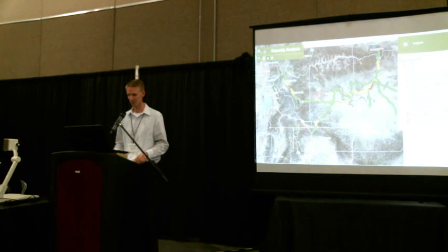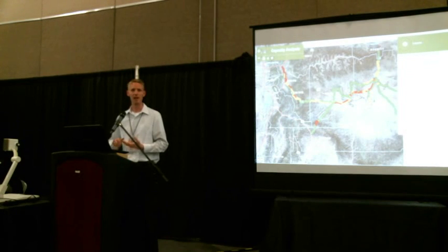So a lot of the level of service analysis in the basin revolved around this concept of percent time spent following on 2-lane highways. I'm opening up this application which shows the results of the level of service analysis for the basin. You can see the existing conditions, green, yellow, red maps showing good, fair, and poor level of service, as well as our range of futures, our 2040 lower volume scenario and higher volume scenario. So we can start to understand where we have deficiencies, identify projects that will address these deficiencies, and start to time when we should include these projects.